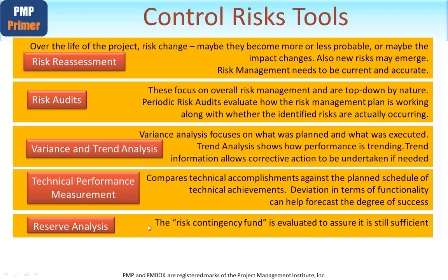You may need to increase it or decrease it if some or more of the linked risks actually didn't occur. Consider this: if there's still money there, then this will refer to potential activities that have yet to be implemented and to use this funding. Therefore, there may be an impact on schedule.